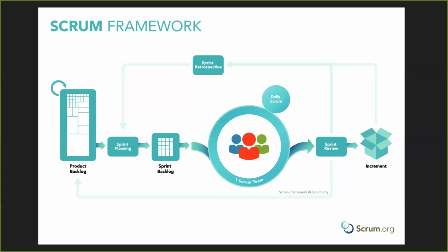As a team, you then decide, okay, these are the most important things. In a week, we can tackle these 2 or 3 things reasonably. And then you put that into your sprint backlog after you've done your planning. Then the team goes away and they start implementing. Every day they have this thing called a scrum. Each team member says what they did yesterday, what they plan to do today, and if there are any problems that they're having. That's a way to keep everybody in sync.